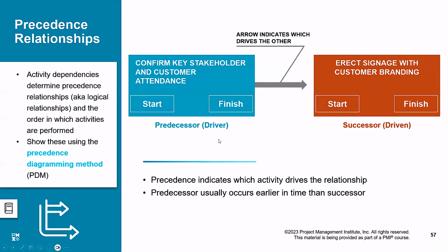Right. So look at this picture now. Suppose you have to plaster a wall and then paint the wall. So there are two separate activities, because plastering work will be done by one kind of people and painting by another. For plastering, you can have a start date and end date, and for painting also. And there's an arrow, which indicates that it is mandatory: without this one, I cannot do that. You have to mention it as an arrow line, one by one, right? So this is called the relationship between activities.